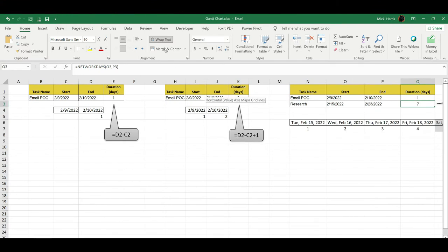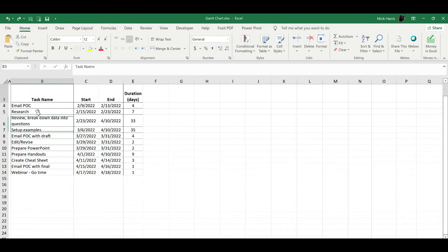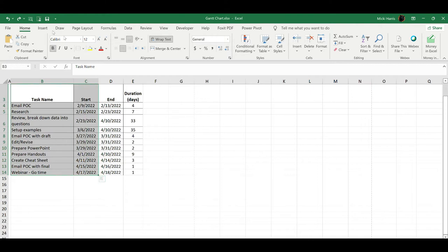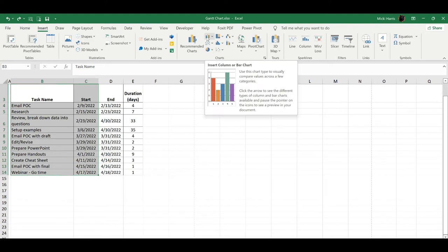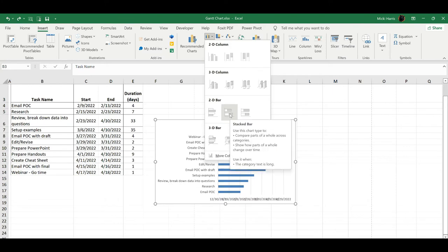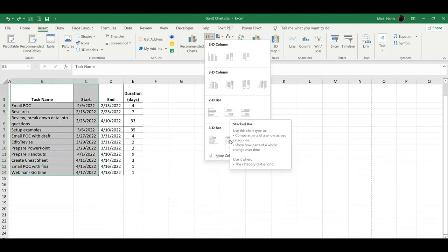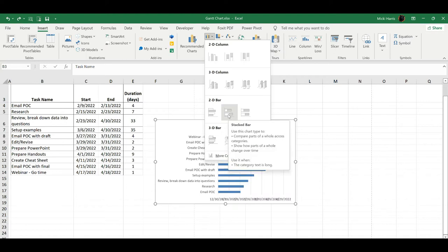Let's get back to creating our Gantt chart. So the first thing I'm going to do is select my columns that have my task name and the start date. I am going to include these header titles for both of these columns. So I select that, go to my Insert tab, and here is my bar or column chart. Click the drop-down arrow, and I need a stacked bar. So you can do a 2D or a 3D. 3D gives it a little bit more pizzazz, but I'm going to stick with the 2D stacked bar chart for now.